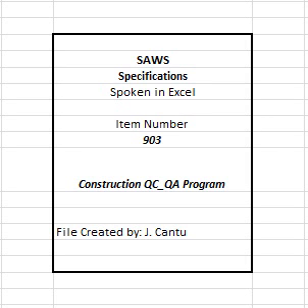4. Pre-construction conference. This conference is a specific contract requirement and shall be held soon after contract award and prior to start of actual construction, contingent on receipt of contract documents specified in the general conditions, including contractor's QC plan. The conference will address contract clauses covering quality control, testing, warranties, safety, personnel, and procedural items with discussions on specific rules and procedures. Specific responsibilities and authorities shall be presented and agreed upon so that the contractor, engineer, and inspector will share the same understanding of the project scope and conditions.